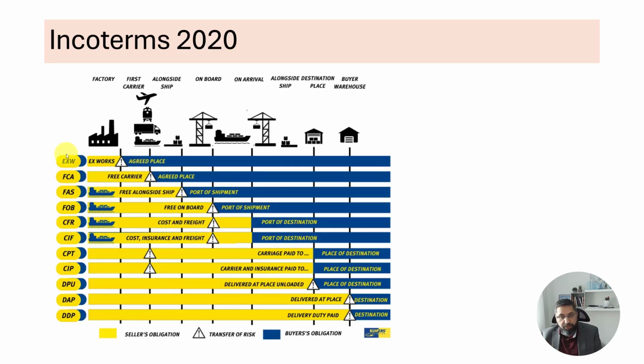Also, some suppliers may be in countries with higher tariffs, other suppliers may be in countries with lower tariffs. So DDP, the last row of this picture, means everything is being covered by the supplier or is included in the price. So the duties, the tariffs, all the cost to take the goods up to the buyer's facility, like their factory or warehouse, is going to be included in DDP. So you want to convert all the ex works type of prices suppliers give you to what the price would be if you did DDP, if you added in all the costs and the tariffs to get it to your facility, and then you compare and select suppliers.